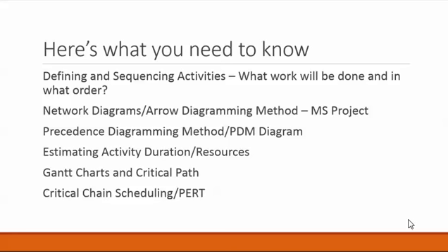You probably need to determine things like aesthetics, color scheme, graphics. You probably need to determine navigation. You probably need to determine a bunch of different things. So you may have planning or design as a phase, and then in design you decompose what all you need to do. What are the activities that are part of the design of this website?